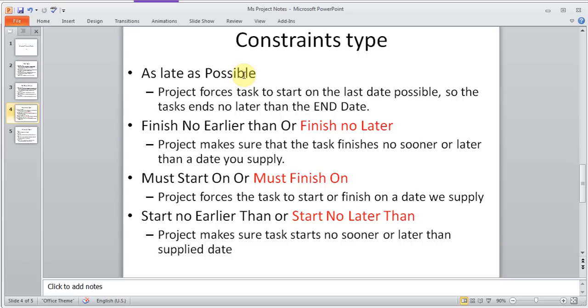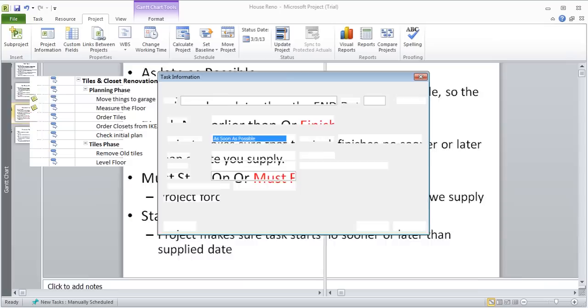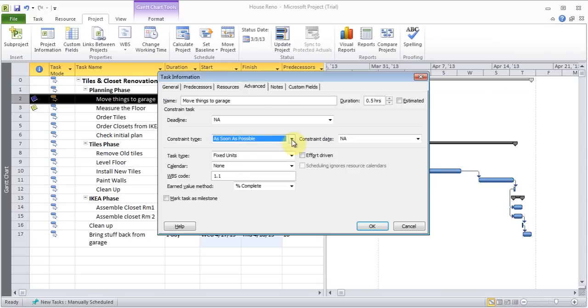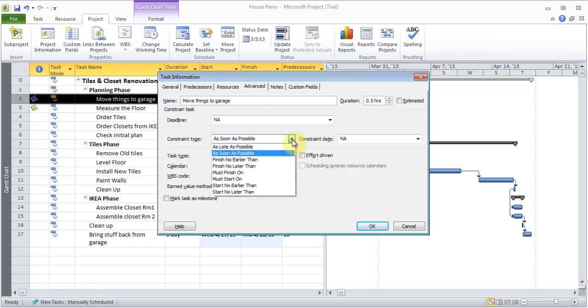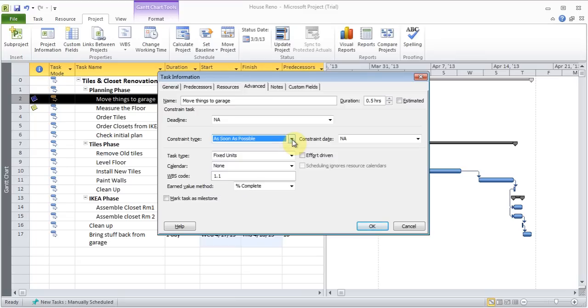So you can set these type of dates to force your task to get done at a certain time or a certain date. And then the last one is start no earlier than, that is project makes sure task starts no sooner than the supplied date. Or start no later than, that is project makes sure that the task starts no later than the supplied date. So there are different types of constraint types that you can apply to it. I am not going to get into this part because as a project management class, you will most probably get to work with this.